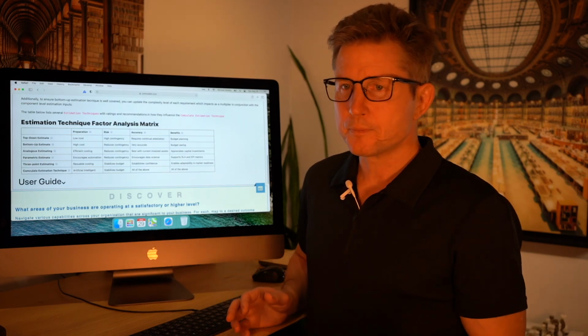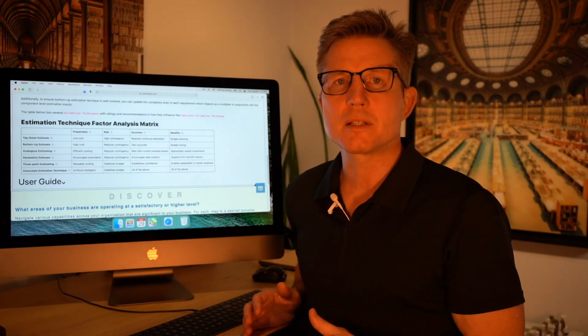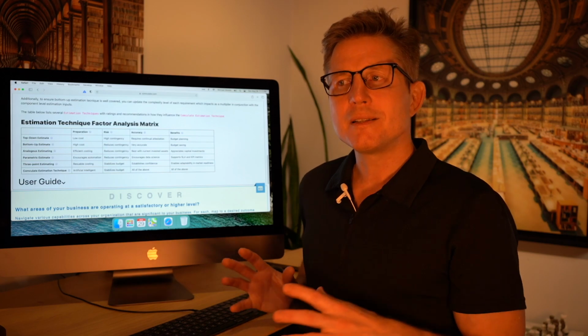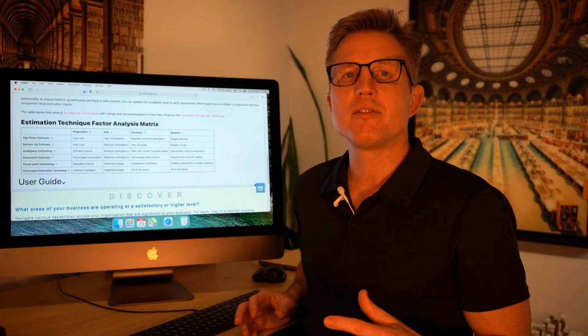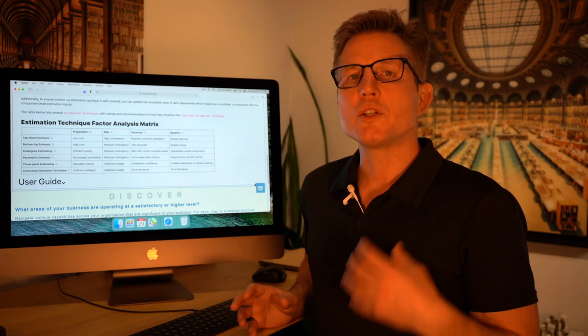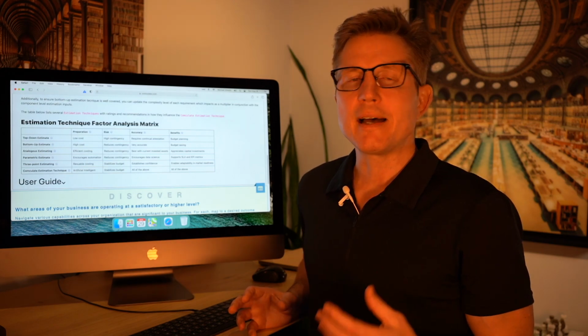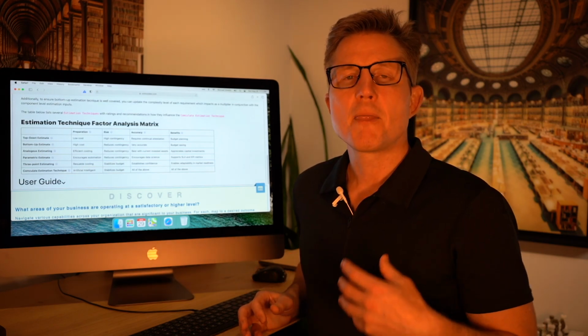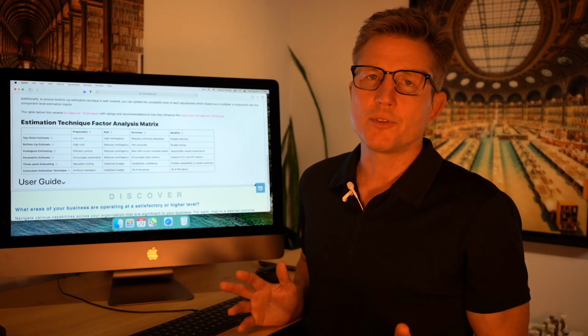So for example, let's say you have 8 requirements, and all 8 requirements most likely have the same amount of effort involved. Well, you just have some parameter that can calculate in one context the amount of work that's required, and then you just multiply that by 8.